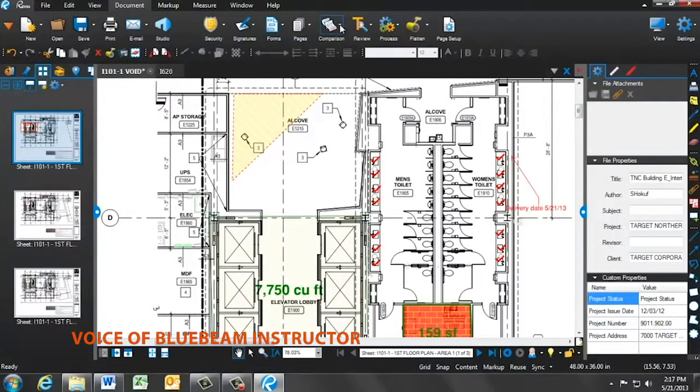Another tool that Bluebeam Review has is document comparison. How this can be used is when new bulletins or updated drawings have been sent and you want to compare the changes against your current drawings. This can come in handy when architects cloud entire sections of pages or when there's no clouds at all. What the comparison tool does is it highlights specific areas of changes that have been made between the 2 documents.